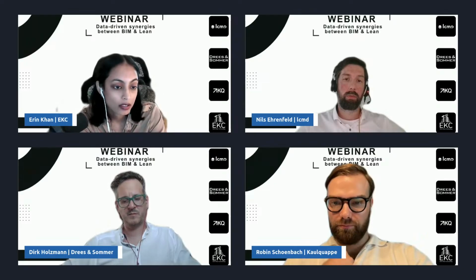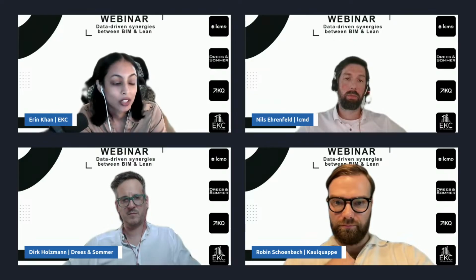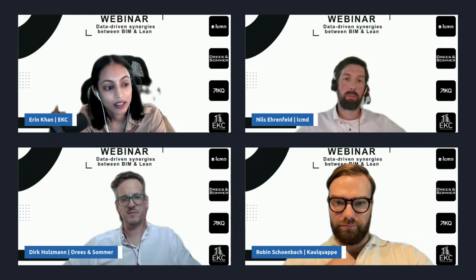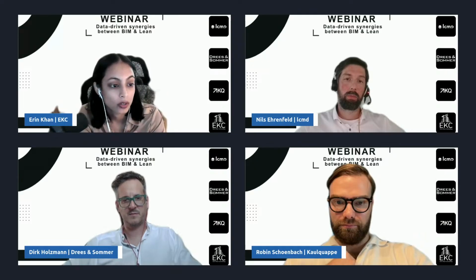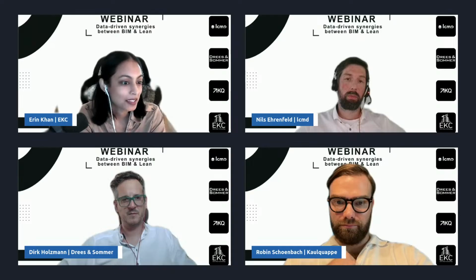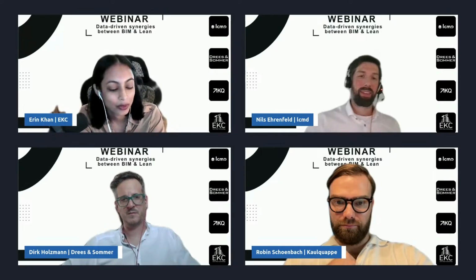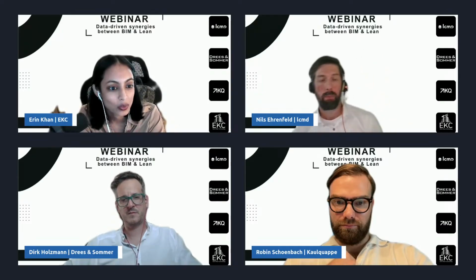So the difference was, otherwise, stopping the job and waiting for material to get there, because you wouldn't really have the data or the transparency, like Niels was saying. But with the information connected from the platforms, you're able to see in near real time where we can adjust our work to keep the project schedule going. So that was one past example, really focused, but I wanted to share that as well.